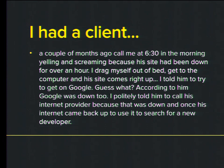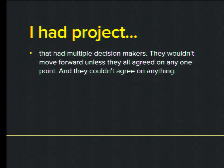We need to be active listeners. The second story: a project had multiple decision makers who wouldn't move forward unless they all agreed, and they couldn't agree on anything. How many of you have been on projects where decisions were made through a committee? It's the worst possible way to engage in a project. Right at the beginning, establish that you need one — or at most two — points of contact who can make decisions on behalf of the organization. Indecision is crippling and causes projects to go way over budget.